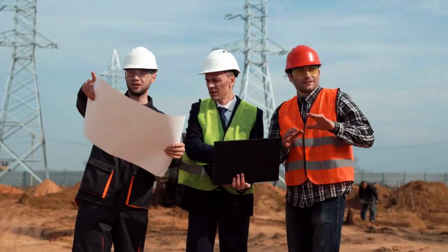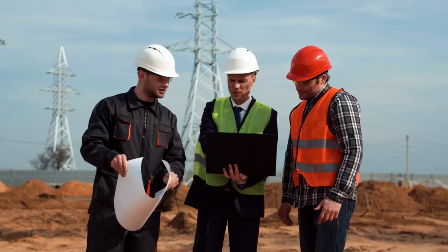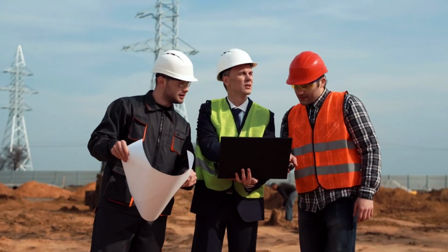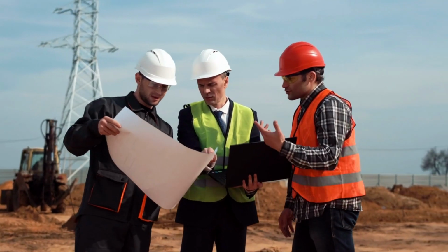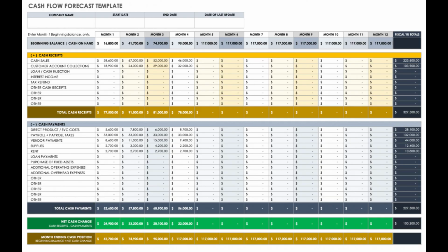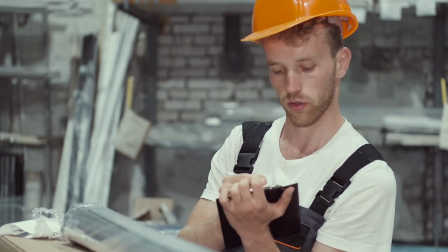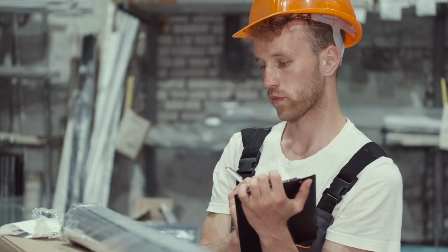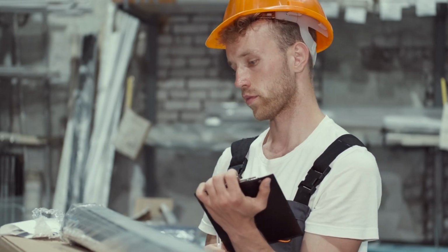subcontractor capability and supervision strength, lead times for key materials and plant, client decision-making speed and variation behavior, approval and inspection requirements that can stop work, cash flow timing and progress payment cycles, and history: defects, disputes, incidents or delays from past jobs. Today we established context, scope, and preparation. In the next part, we move into assessing risks in more detail and planning controls and responses.